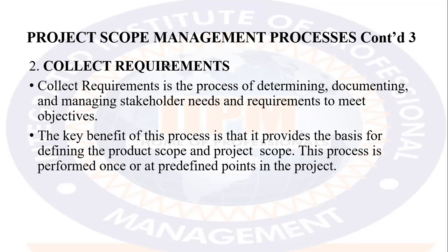When the period of sketch drawings is over and signed off by you, based upon provision of relevant documents like the site plan and your list of requirements, I will drop a sketch trying to reflect what you want, both plan-wise and aesthetically. Then I will consult with the relevant authorities to know their planning rules in that area. Third step is when the sketches are agreeable to both parties, the architect and you, the client. I now proceed to working drawings, whereby I call on board the structural engineer, the mechanical and services engineers. Okay, thank you.